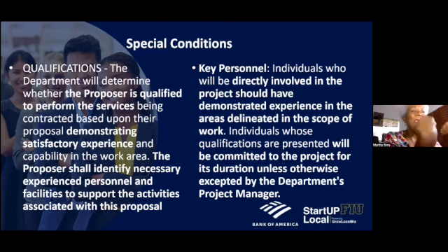You propose one, and the department has to accept it, but always have a number 2 personnel, because in case something happens to that person, the replacement has to be equal or better. And still, it will take the department to decide whether that person is okay. So the individual whose qualifications are presented will be committed to the project for the duration unless accepted by the department.